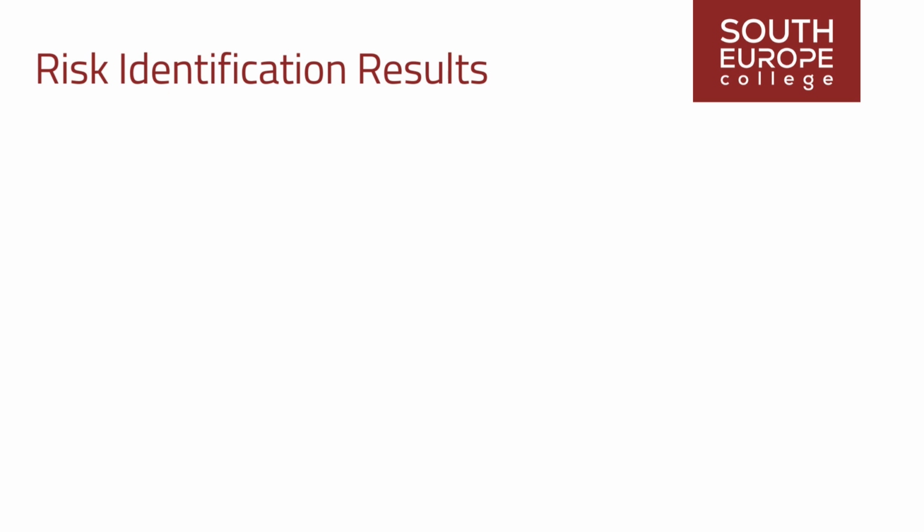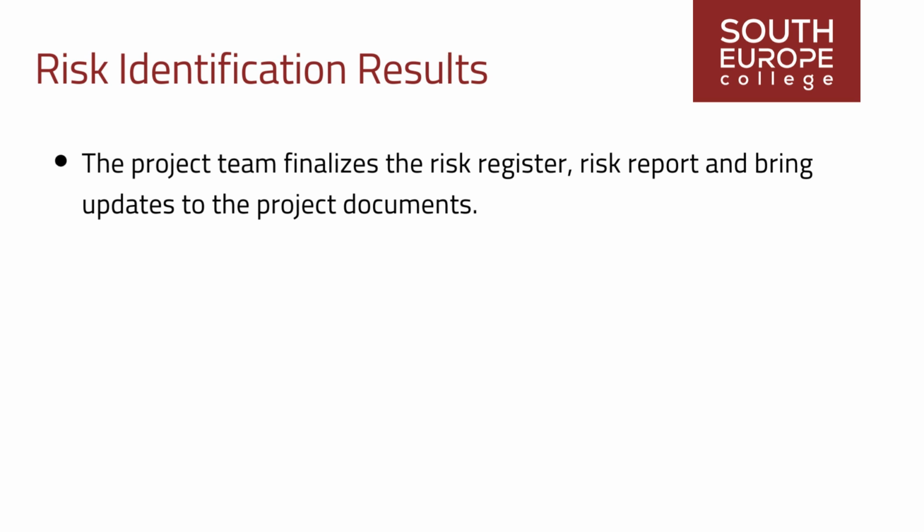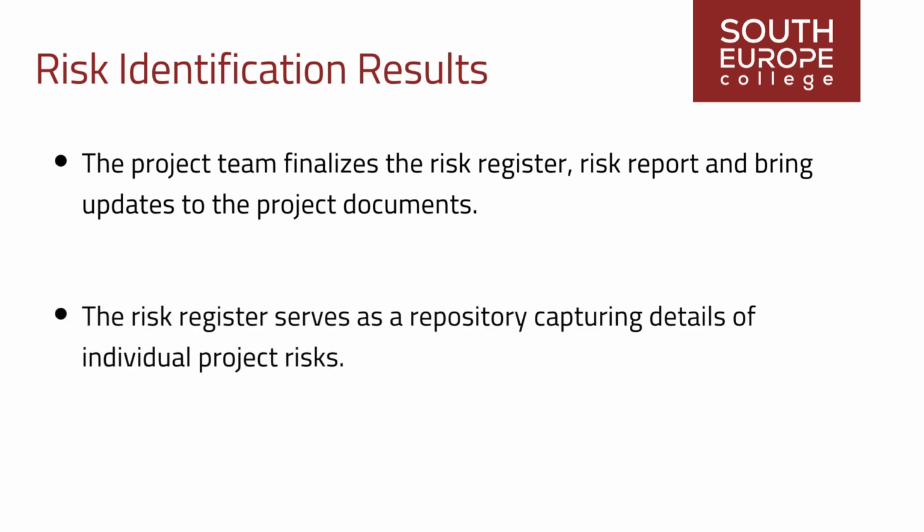Towards the end of the risk identification process, the project team finalizes the risk register, risk report, and brings updates to the project documents. The compilation of the risk register serves as a repository capturing details of individual project risks.